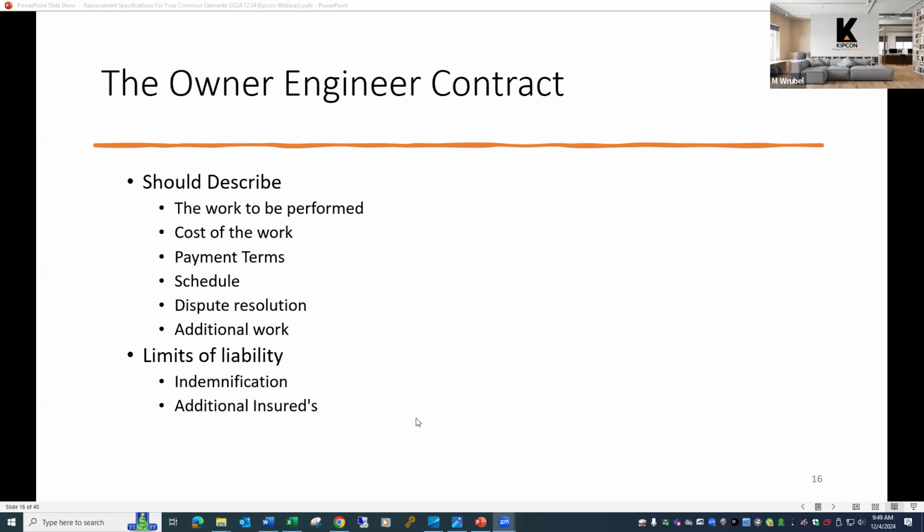If there is a very defined scope to the project, oftentimes the engineer can provide a time estimate or provide a maximum fee. You're still being charged at time and expense, but there's a cap to it. And if there is a cap to it, the engineer may define a little more precisely what services are included, such as maybe number of site visits, or time spent on site, or something of that nature.